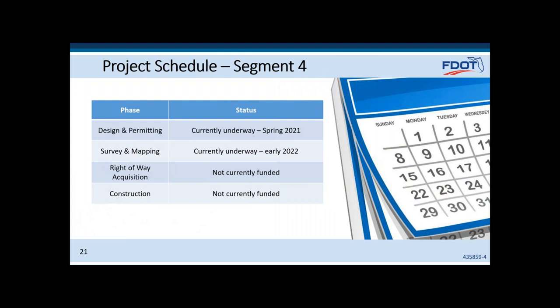We are currently in the design phase of the project schedule. Final design and permitting are to be completed by spring 2021. Survey and mapping are also underway and are anticipated to be completed by early 2022. Right-of-way acquisition and construction are currently not funded.